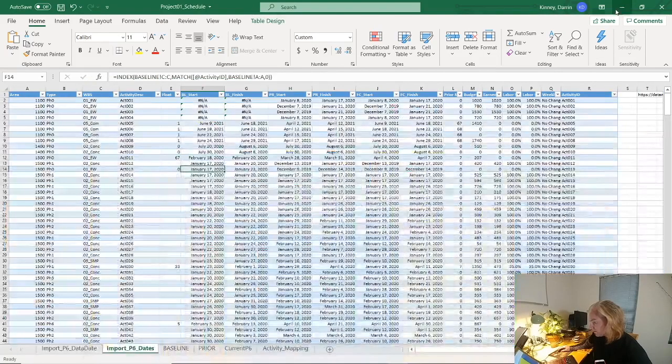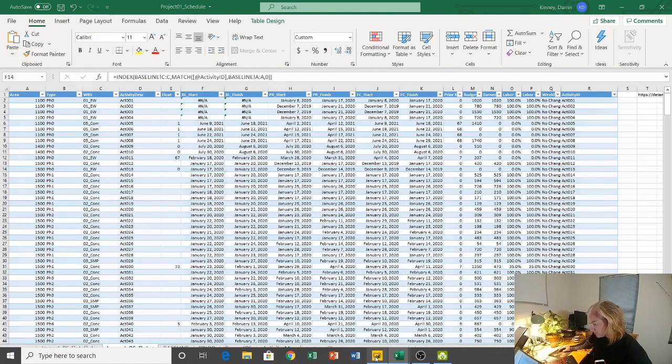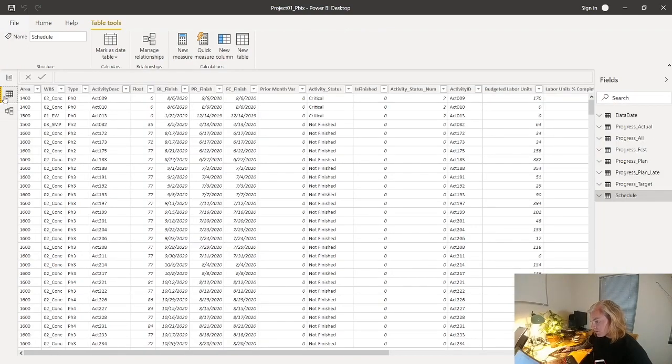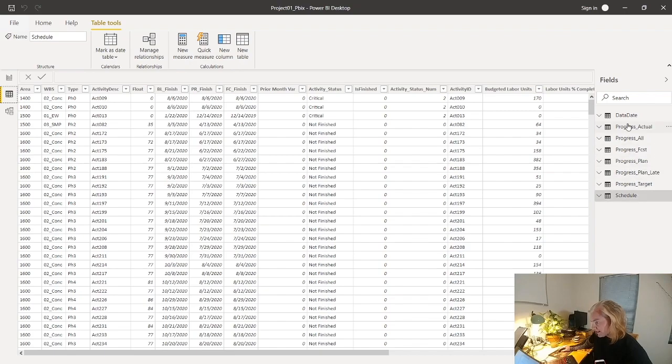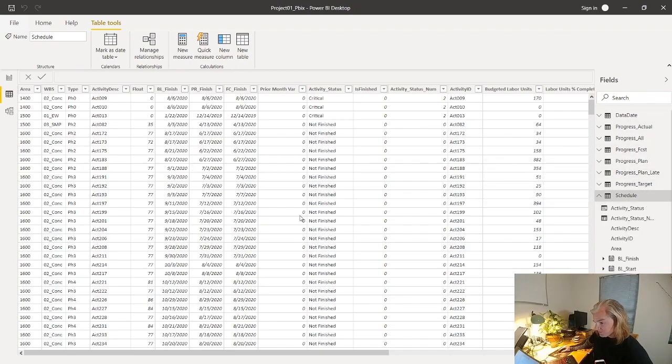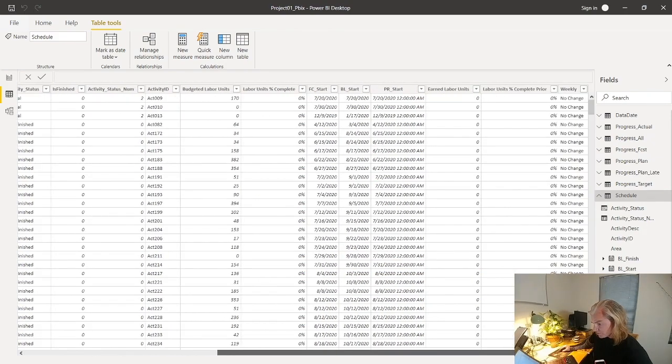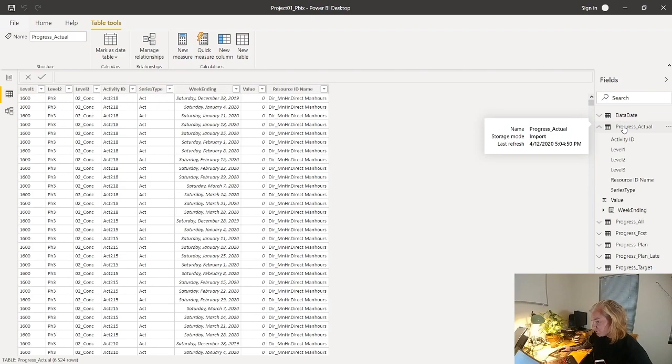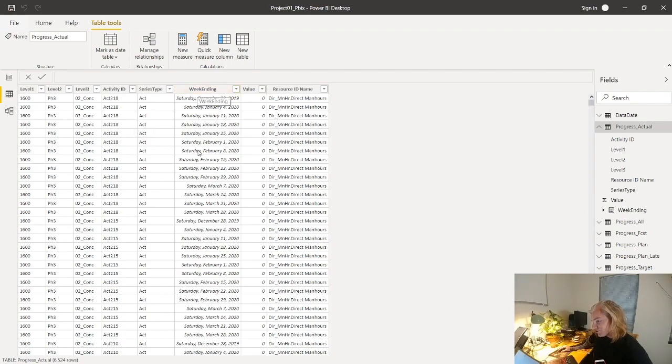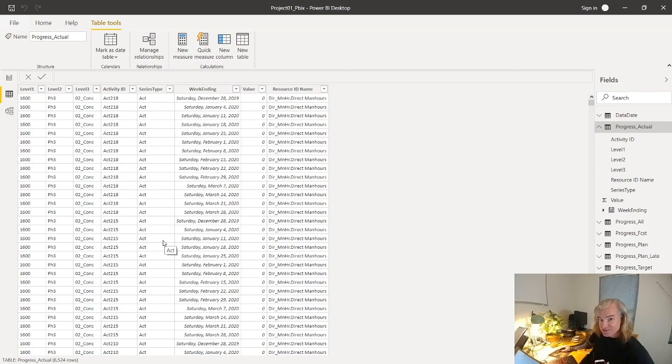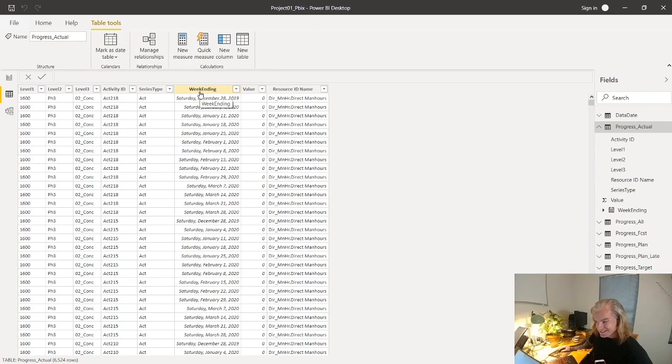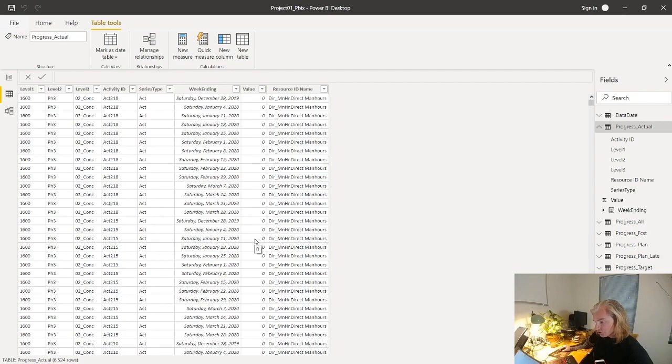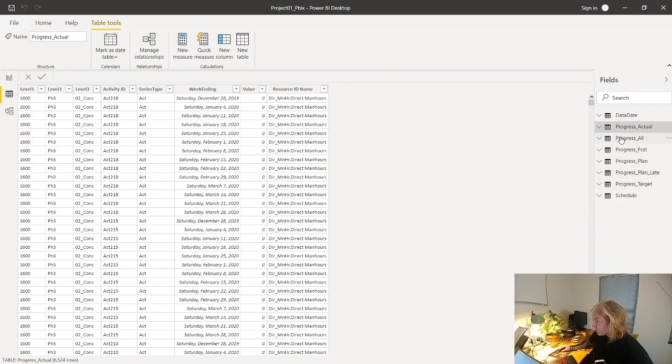When we look at Power BI, I've actually brought in every tab from the files. The schedule I'm only bringing in just the flat file with very little transformation. With the progress information, all the progress information I do need to unpivot. I change the week date in the Excel file. Primavera gives us the week beginning date but this database needs the week ending date, that's usually your key. So I add six to everything as well as doing an unpivot action where I'm going to say this is my series field, this is my week ending, that's my earned units for that particular week ending period. Do that with each one of the tables.